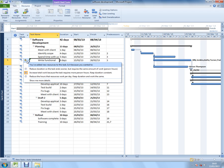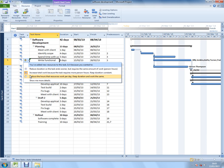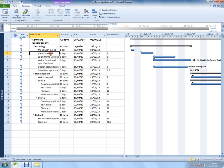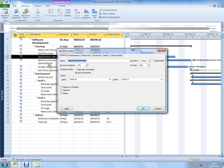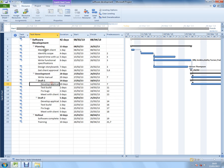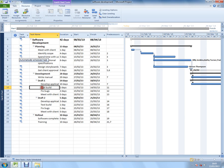So if I wanted to, I could reduce the task - maybe the extra effort is there to reduce the task duration or reduce the hours per day, as opposed to increasing how much work is going on. I'll leave it as the default here. If I carried on doing some bits in this project, that triangle would disappear like that. Just double-clicking and coming back out is enough, and it would forget all about what you're doing.